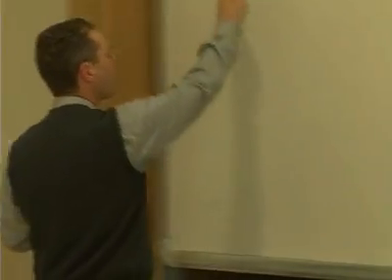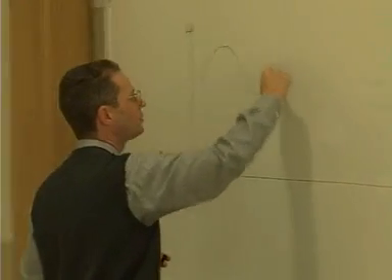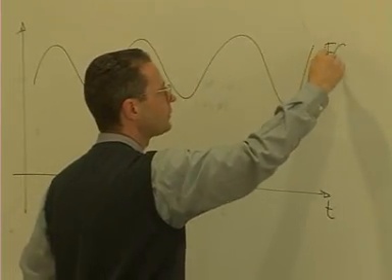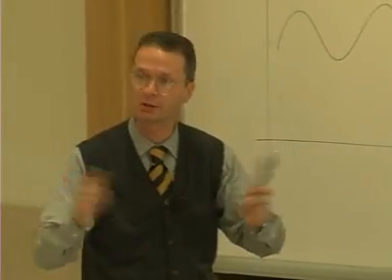Suppose that your financial plan shows you that the trend of the free cash flow will be as such. Okay? An alternative idea could be, let's stipulate with the banks an agreement according to which a certain percentage of the free cash flow every year will be dedicated to the repayment of capital and interest. Let's say, for example, that 70% of the free cash flow will be paid in terms of capital and interest.